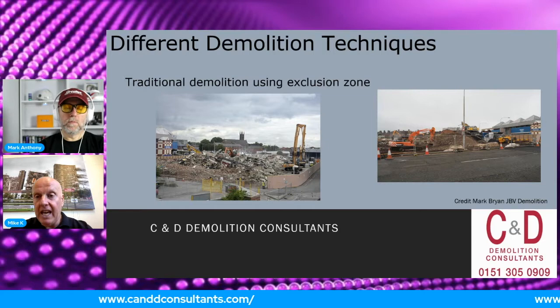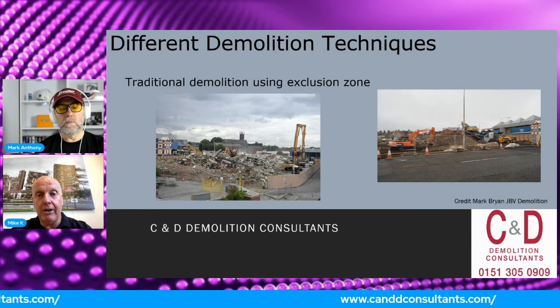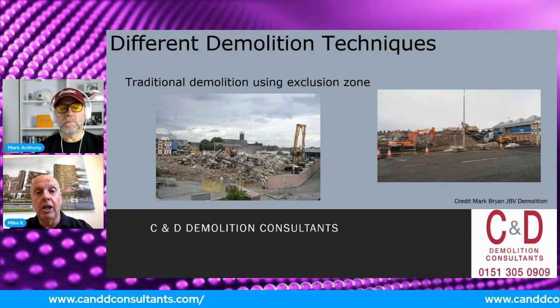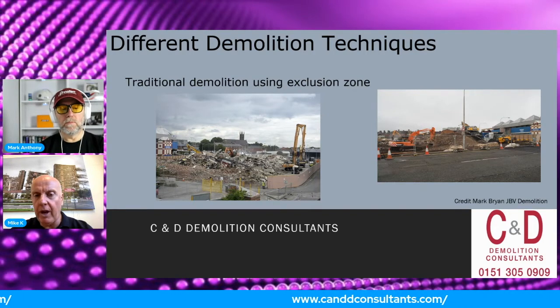So what we've done here is we created an exclusion zone. We got enough plant and machinery to bring it down in the weekend, a bit like a bridge over a motorway, which people have been doing. And we got it down safely. Traffic was only interrupted for one weekend, the bulk of it on the Sunday.